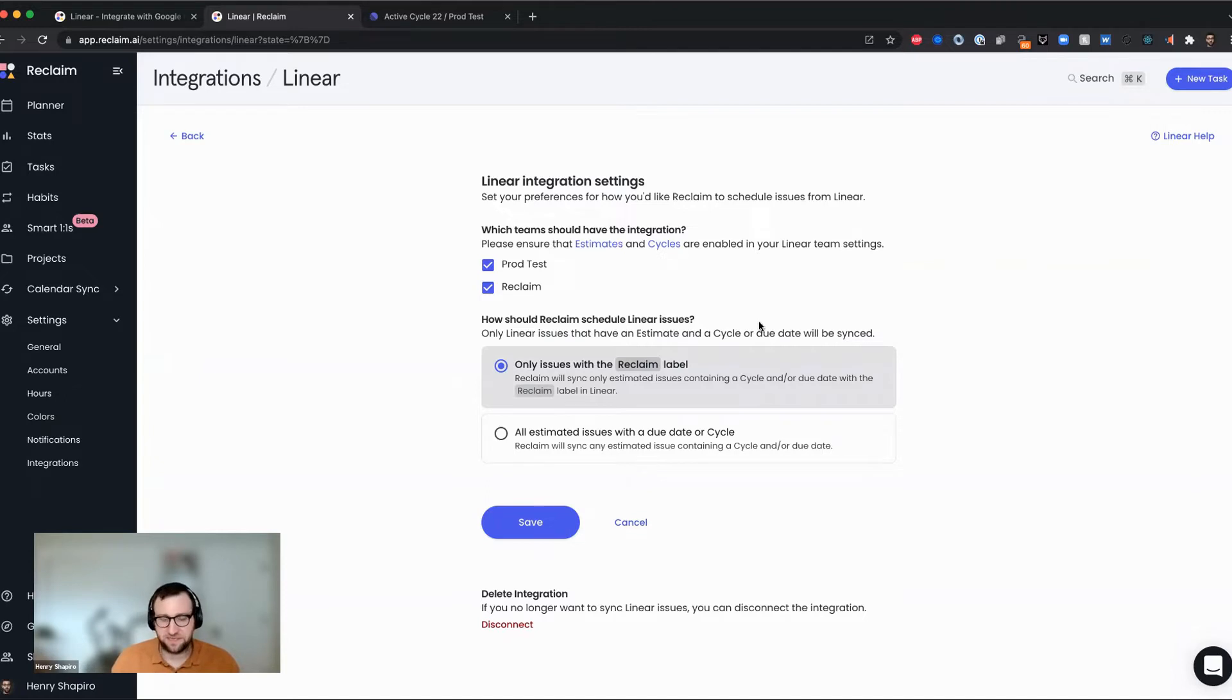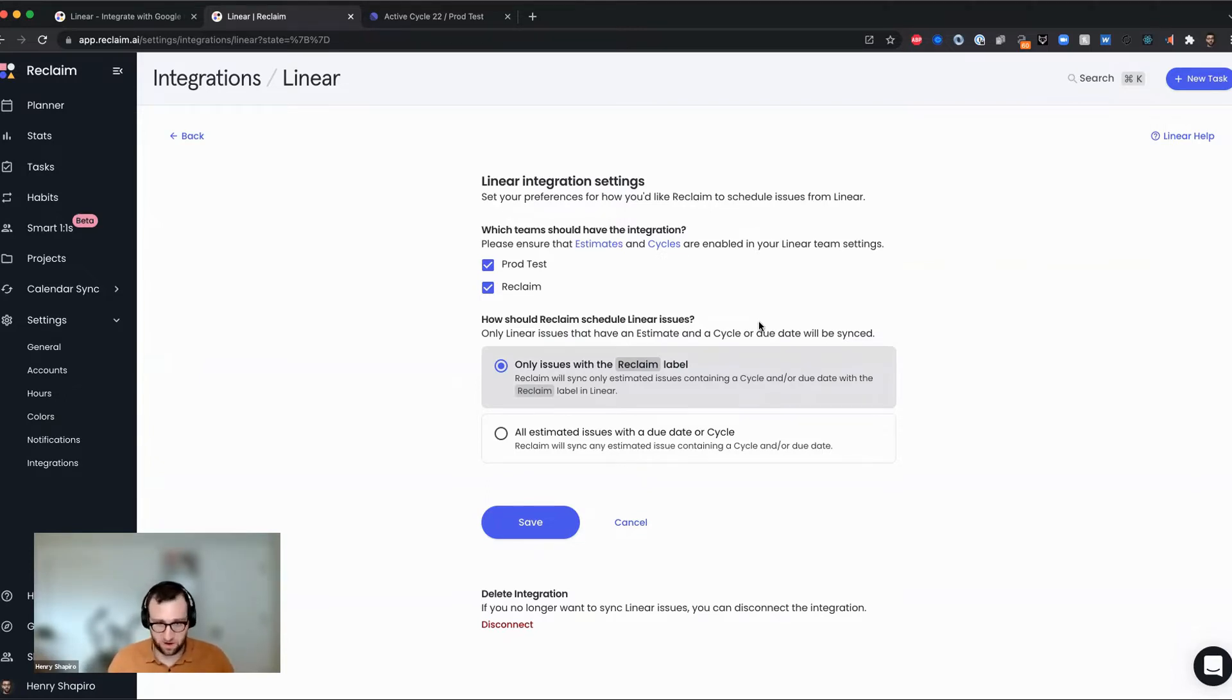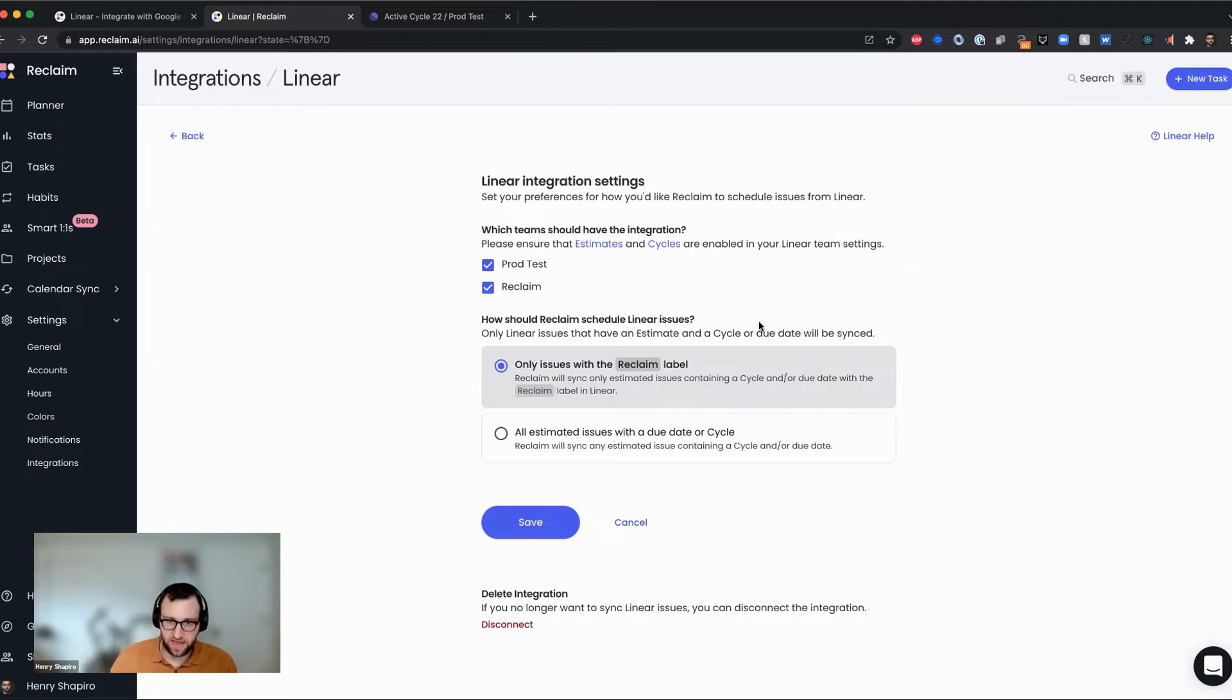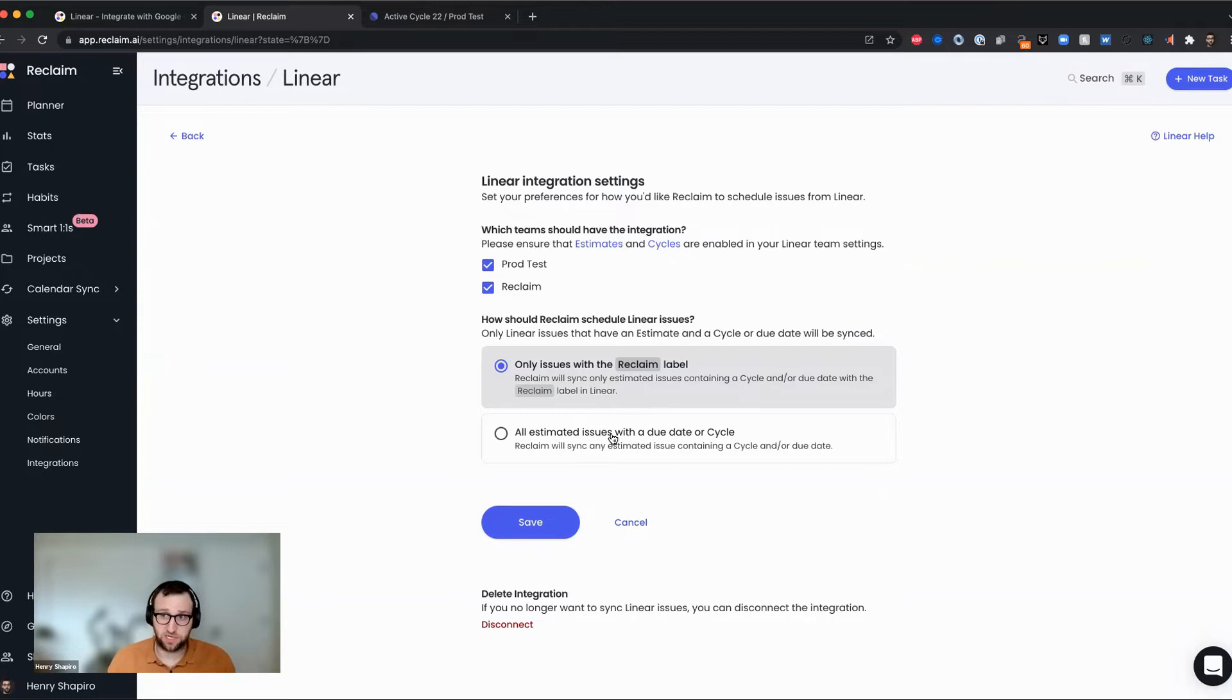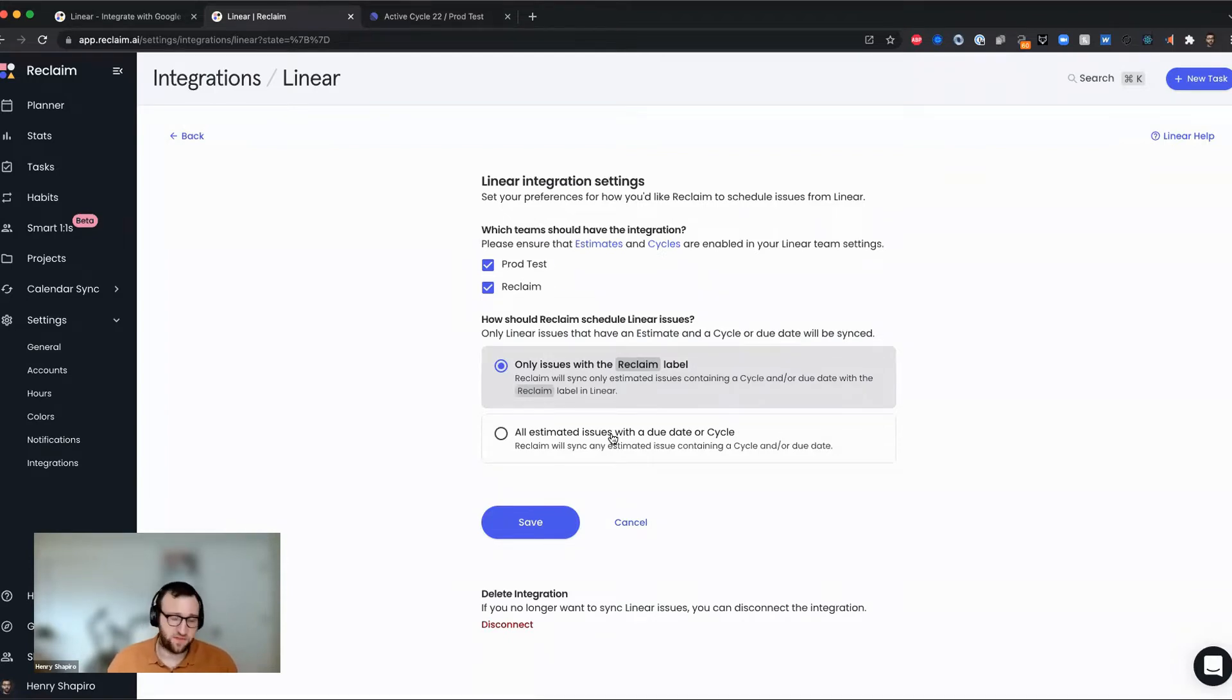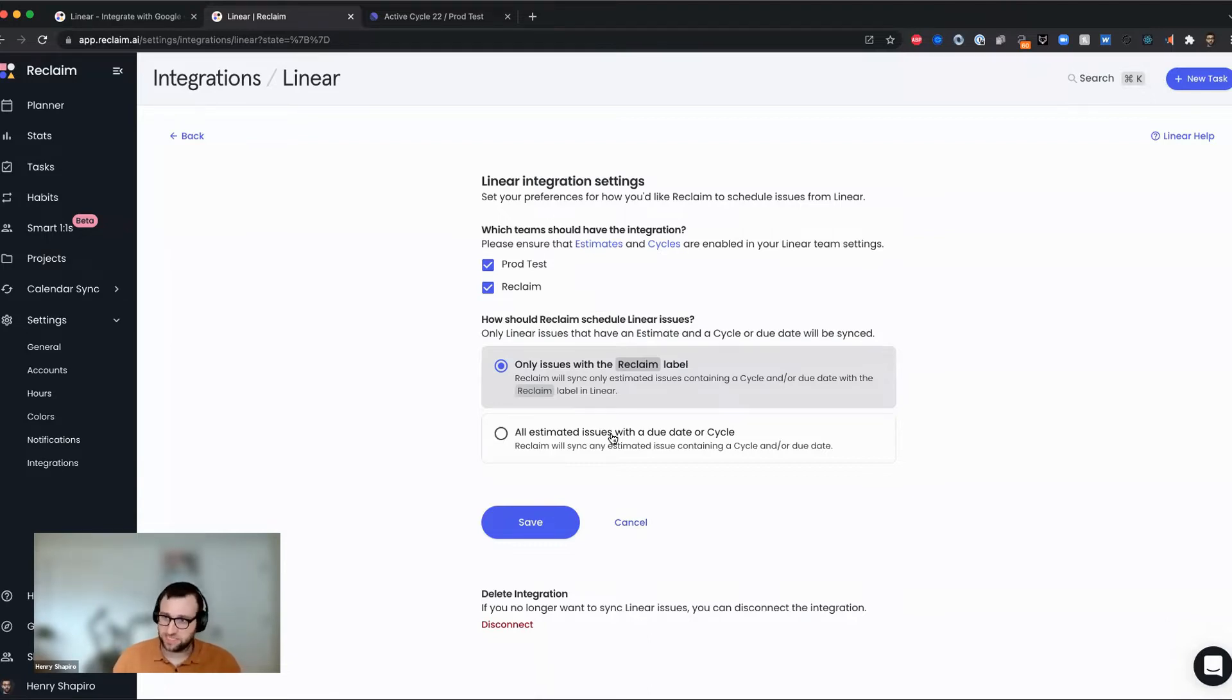The next setting here is about how we actually sync those issues. And there's two options here. One option is to tag your issues in linear with a label called Reclaim. And that label will be a signal to Reclaim that it needs to detect that task and block time for it on the calendar. The other thing you can do, this is what's on by default, is you can opt for all estimated issues that have a due date or a cycle to get synced to Reclaim automatically.